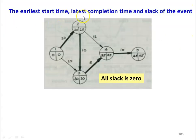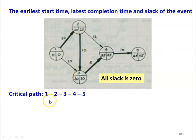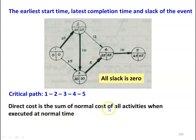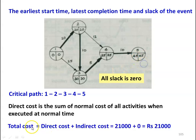The earliest start time, latest completion time, and the slack of all the events are shown in the network. The activities are 1-2, 1-3, 2-3, 3-4, 2-4, and 4-5. The critical path is 1-2, 2-3, 3-4, and 4-5. The normal time is 45 days for the network. The direct cost is the sum of the normal costs of all activities, which equals 21,000. With indirect cost equal to 0, the total cost is 21,000.